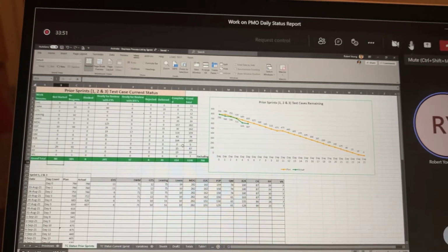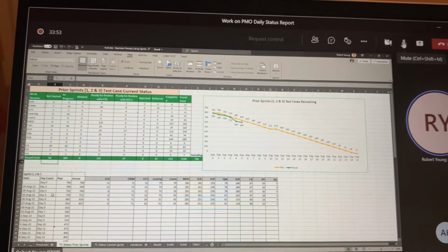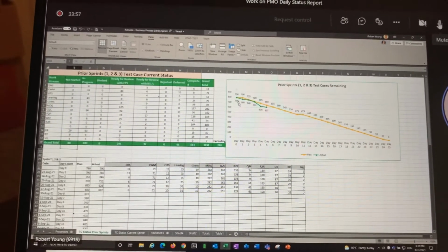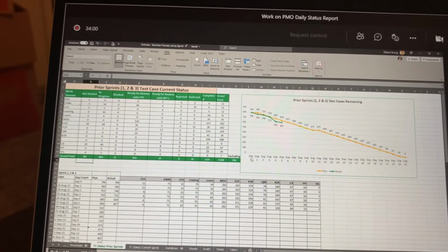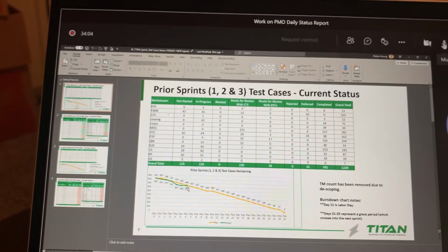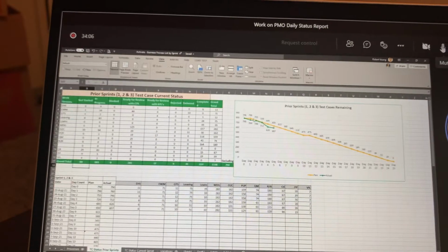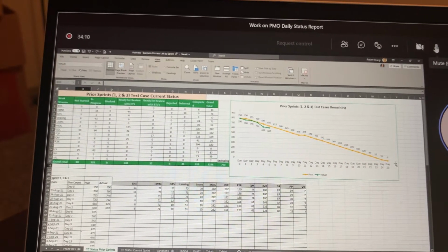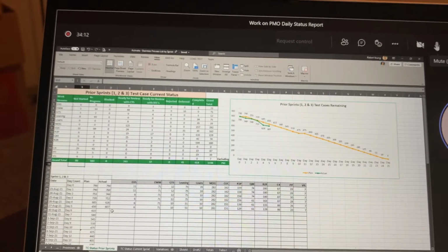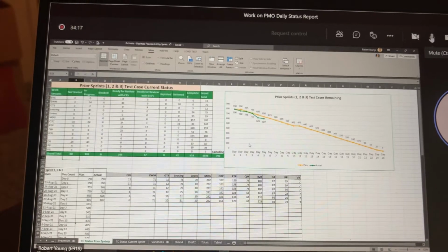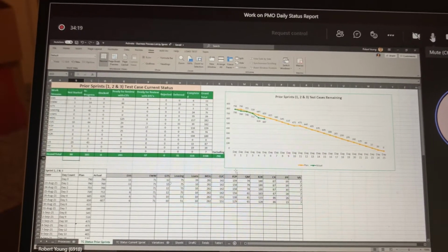The other observation is since this plan amount has decreased, right? You see here, it's 821 for yesterday's report. It's now at 790, which means that the burn down rate needs to change. It shouldn't change, but it needs to, I think.